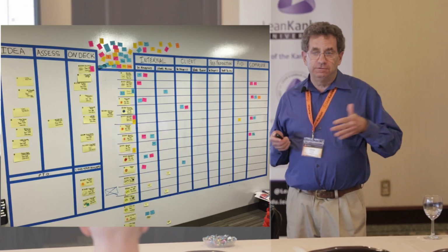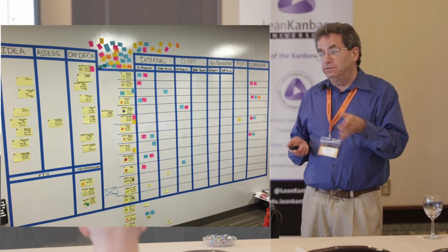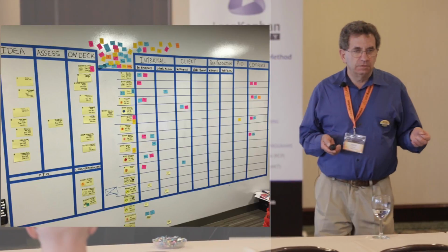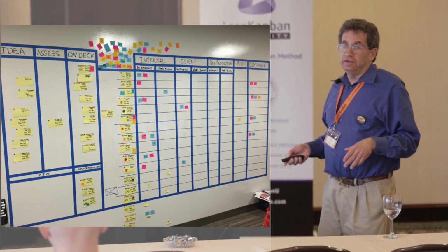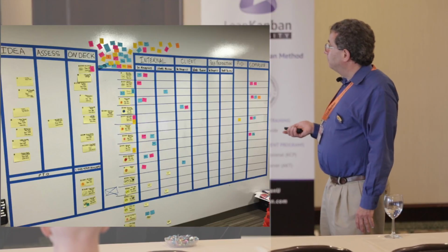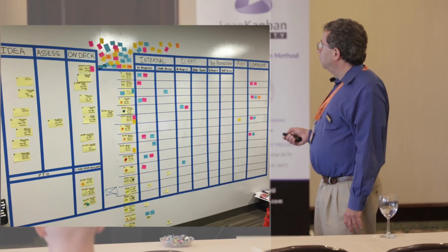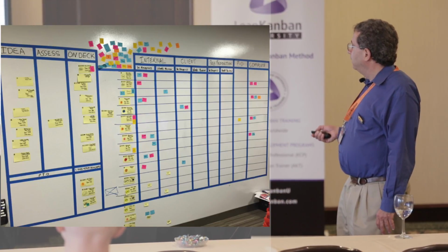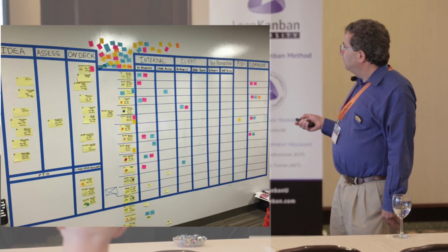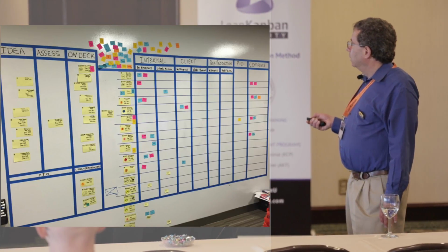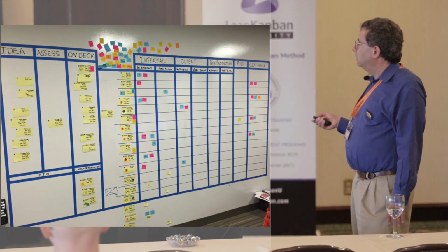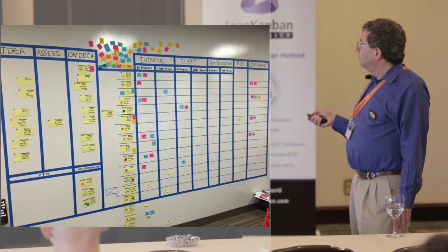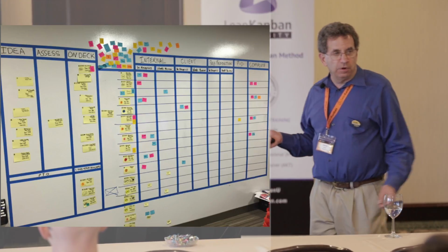So this is almost like a continuous flow operation because absolutely every single day we are dropping emails. We even do emails on weekends to some of our customers. So it's as close to continuous flow as you can see in this kind of work. Okay. So we initially set up, first, to make the work visible. Each of these tickets represents what will eventually become an email. It was originally set up with working in progress and done columns. And again, we have the internal and the client. These tags were color-coded by skill set, designer, writer, production artist.